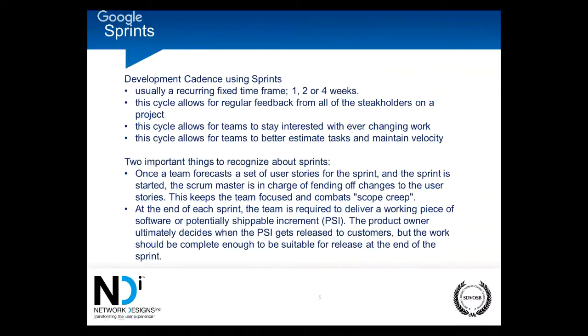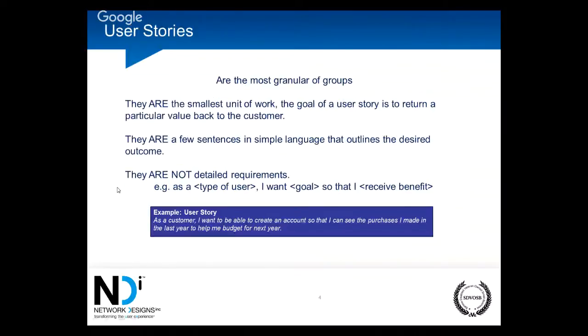For example, the example that we used here was to be able to create an account. If that's the first user story we're going to bang on, then there are some tickets, some issues, that have to be laid out in advance, like build the database, define the user account structure, okay? Define the password parameters that we're going to require. Define the infrastructure. What server are we going to use? What database product are we going to use? Each one of those would be a different issue. So you're going to have, let's call it 20 issues, just to get this one user story right.